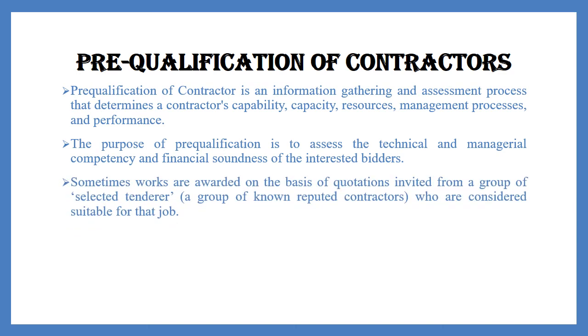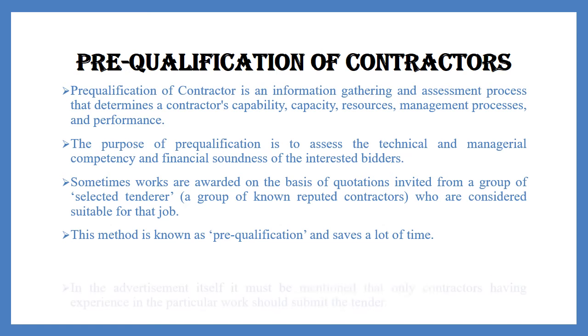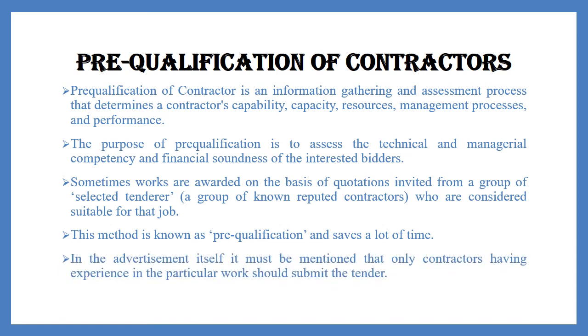Sometimes works are awarded on the basis of quotations invited from a group of selected tenderers who are considered suitable for that particular job. This method is known as pre-qualification and it saves a lot of time. In the advertisement itself, it must be mentioned that only those with contracting experience in the particular work should submit the tender.